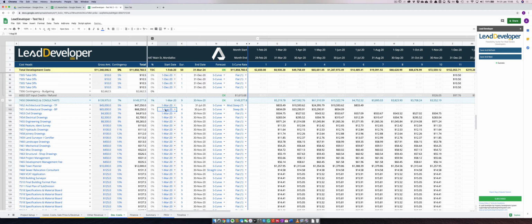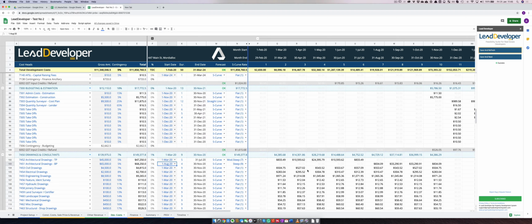Look, this is happening in 20 and I know this is 4, so now I can change that, and now all this total will then move on to starting from the month of August. So this is the important bit to understand, what each of these S-curves and the steepness of the S-curve would do to your cash flow, how you are planning your cash flow, and how you are going to project it for your development. The more accurate you can do that, the more you'll be able to figure out how much money you will need to put in from your own pocket as the project starts.